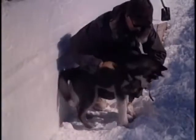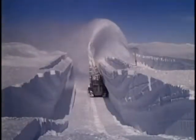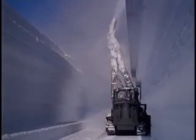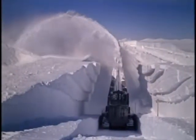Camp Century was starting to grow, and so was Muckluck. We used three Peter plows to cut all the different trenches we needed. By making a series of undercuts, the width of most of the lateral trenches was greater at the bottom than at the top. This cut down on the amount of roofing material required.